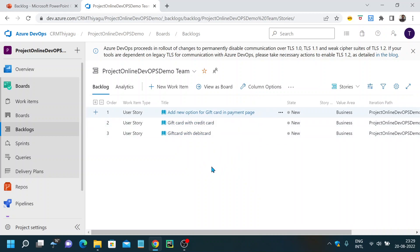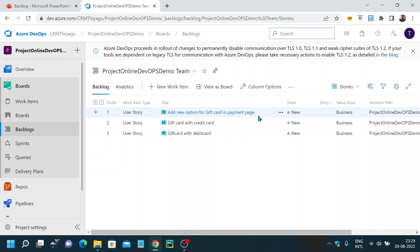Now I have all the items in my backlog. Based on priority, I can drag and drop these items. Whenever a new sprint starts, generally what you do is pick these items and start working on them accordingly. Say if tomorrow you are starting a sprint and sitting in a sprint planning session, you pick the user stories by priority. Here, priority one is 'Add New Option Called Gift Card in Payment Page,' so I will pull this into my sprint and start working on it.